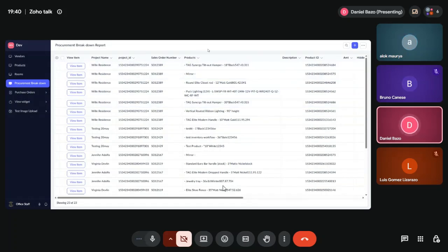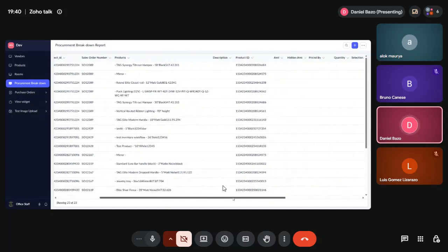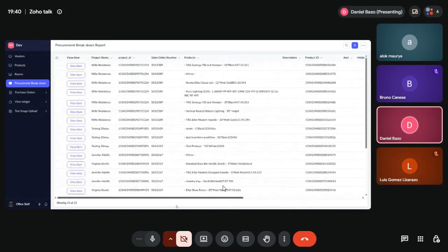Now when I have to order stuff, according to their item type, the lead time, and the installation date for each. So that's the first one. I should be able to easily know, from the items I have here, which ones have to be ordered soon, or we are really late.